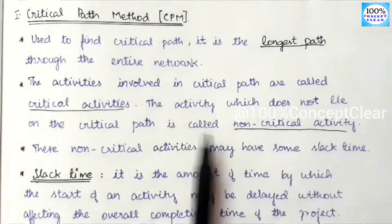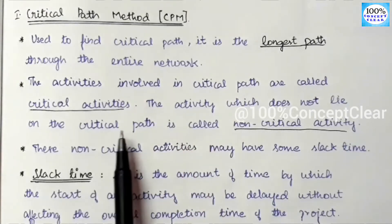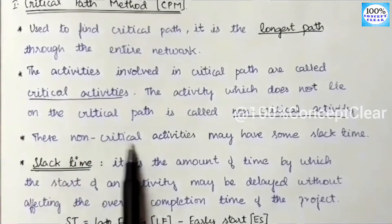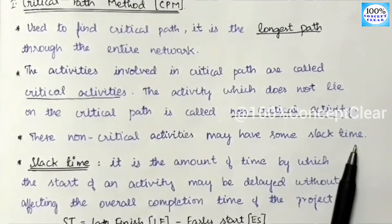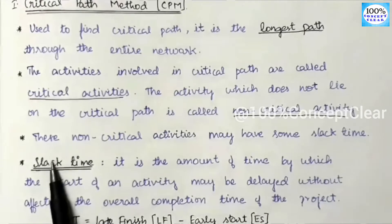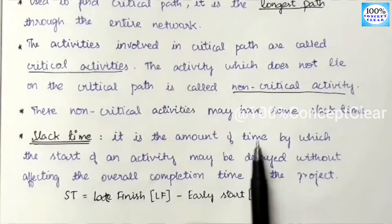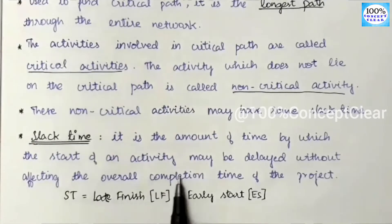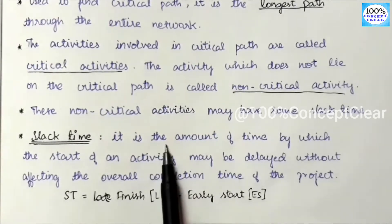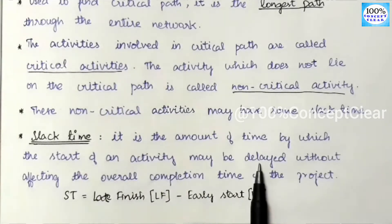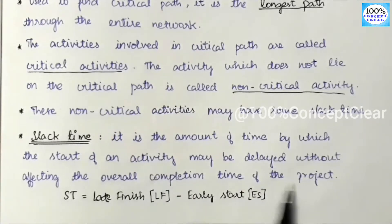In the network diagram, non-critical activities may have some slack time. Slack time is the amount of time by which the start of an activity may be delayed without affecting the overall completion time of the project.